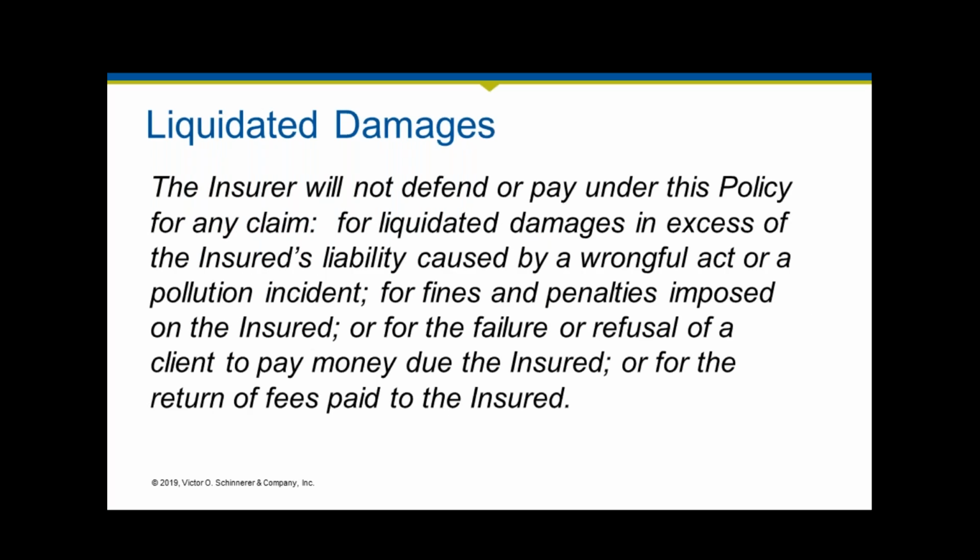Now, liquidated damages, I think, are a good example. Liquidated damages are excluded from professional liability coverage because, again, they're a contractual obligation. But they're only excluded if they're in excess of what your liability would be because of your wrongful act, your negligence in the performance of professional services, or your pollution incident. So liquidated damages can be enormous. They can be stated damages and can go far beyond what you would normally be held responsible for.